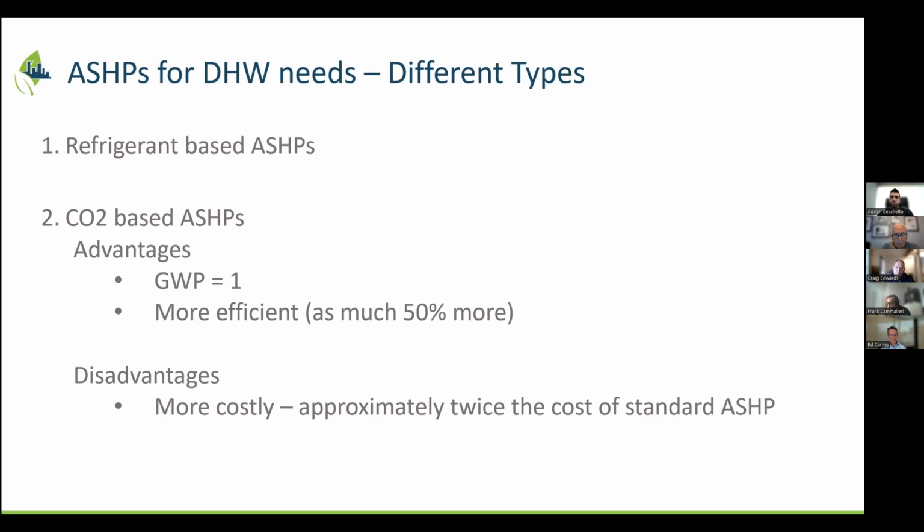And it sounds like we're hoping that this is more of a temporary thing. We're trying to bring that down to more reasonable lead times. I guess typically we've seen equipment lead times around 10 to 12 weeks. So I'm sure you guys are striving towards that, or at least who you represent are striving towards that, which is great.